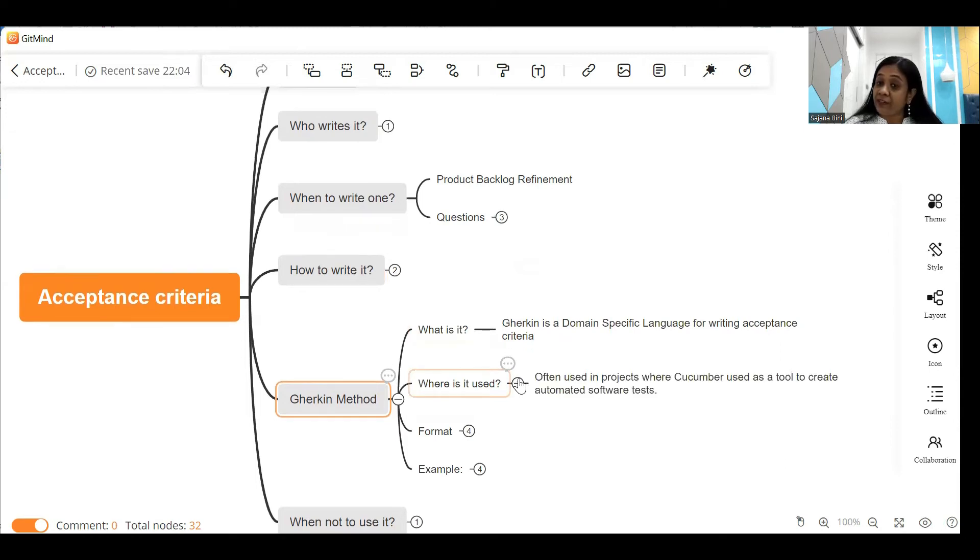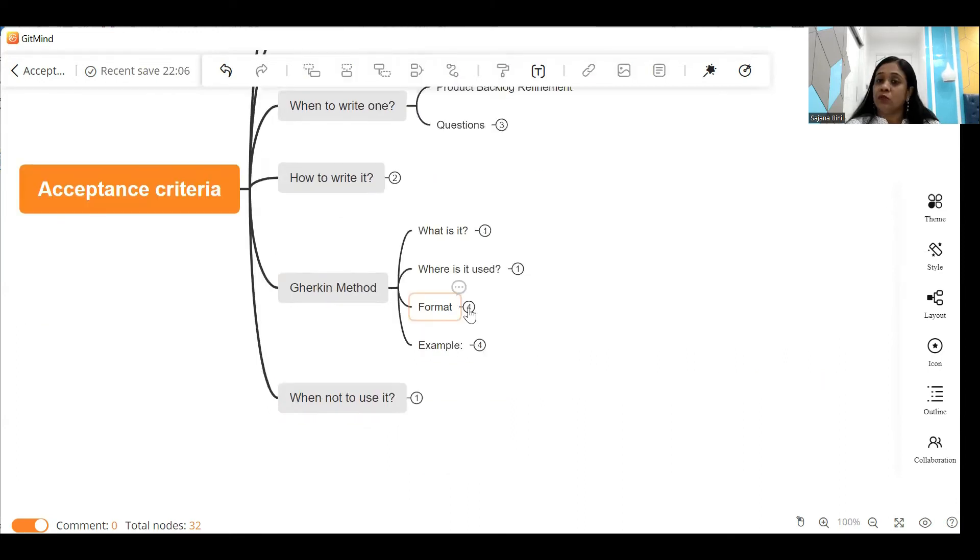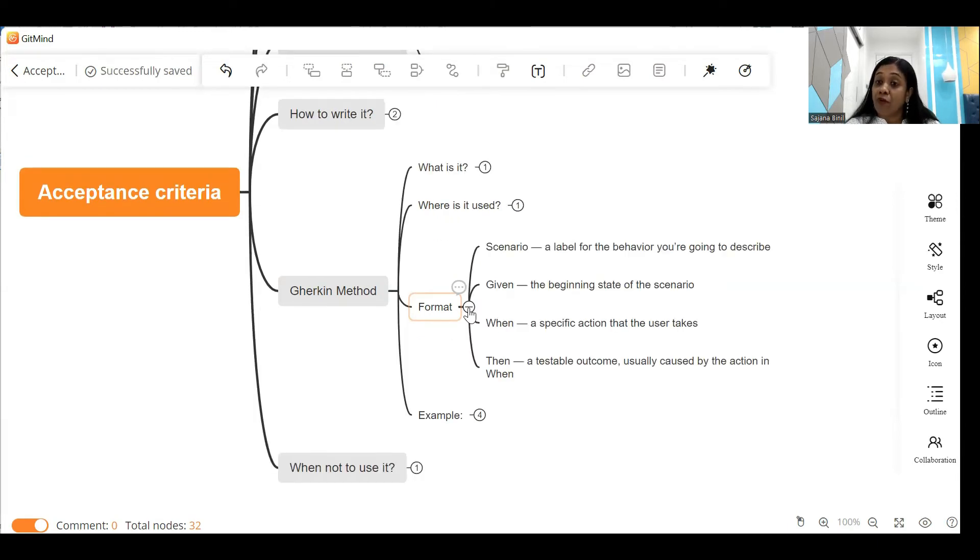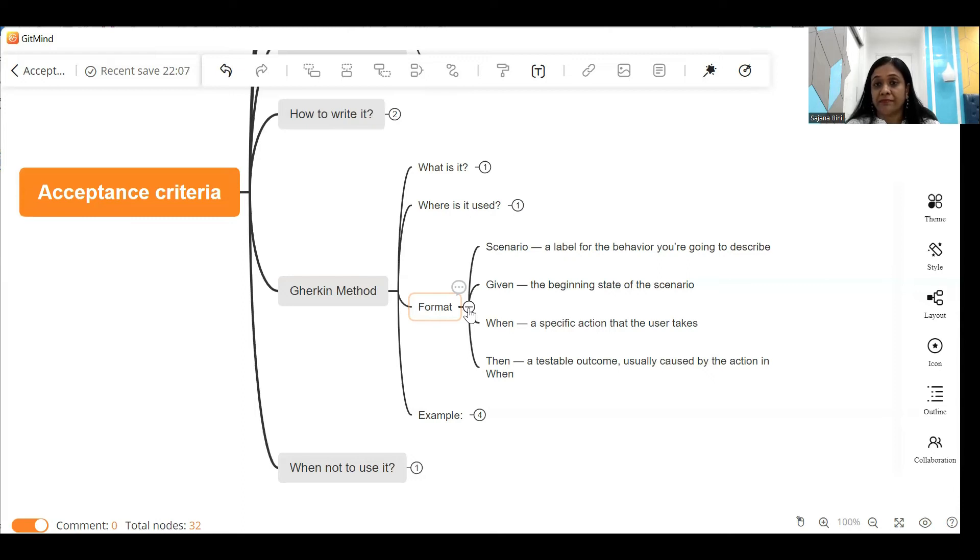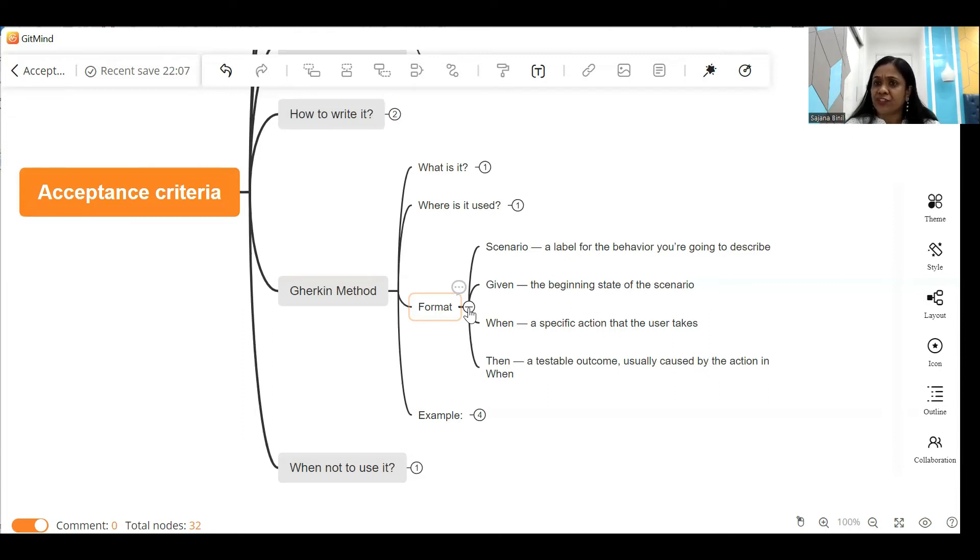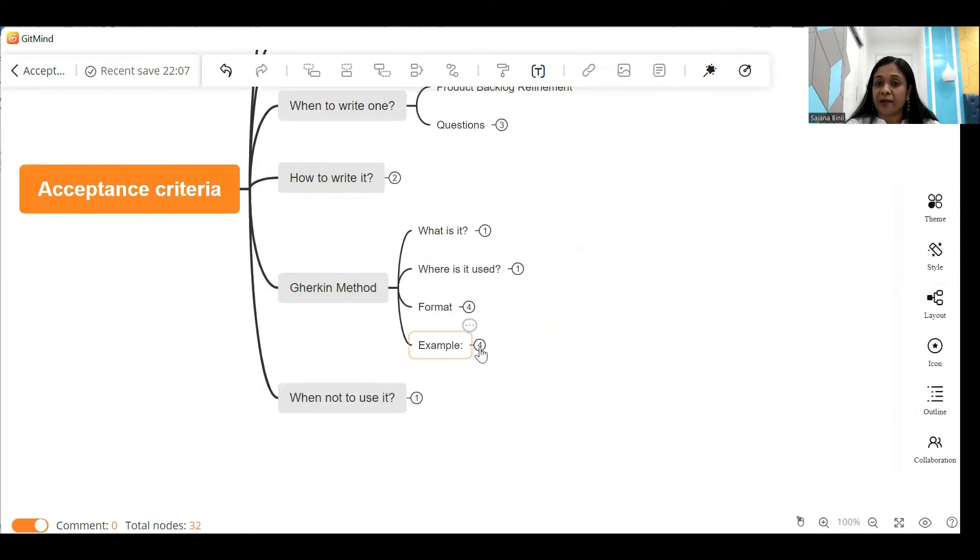Where is it used? It is often used in projects where Cucumber is used as a tool to create automated test cases. So what is the format of this Gherkin technique? The format is as you see on the screen: scenario, given, when, then. Scenario is a label that you give to the behavior you are going to describe. Given is the beginning state of the scenario - that means it's a precondition. When is the specific action that the user takes, and then becomes a testable outcome, usually a system behavior.